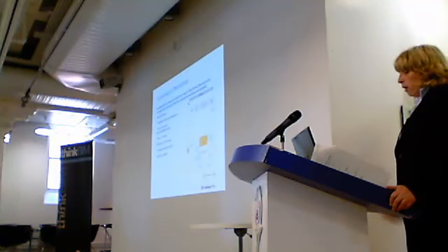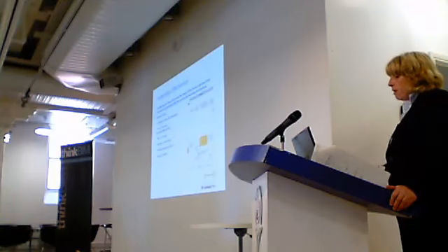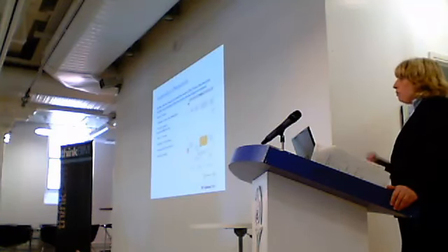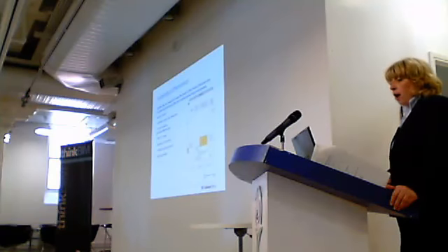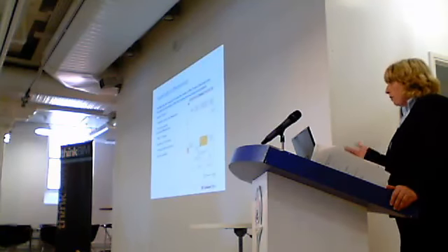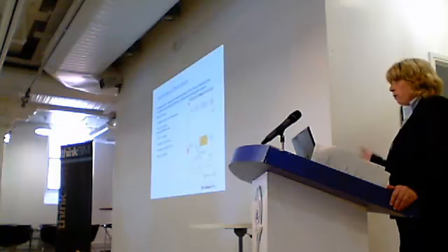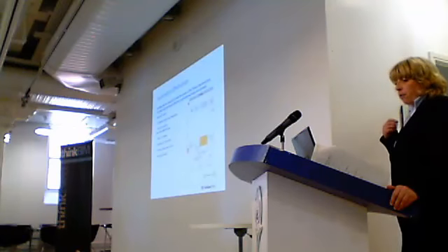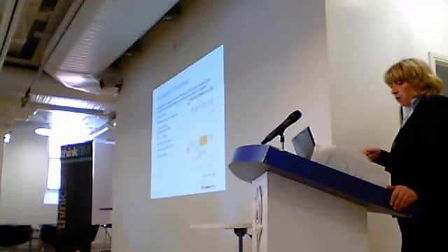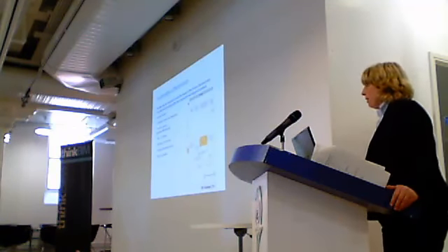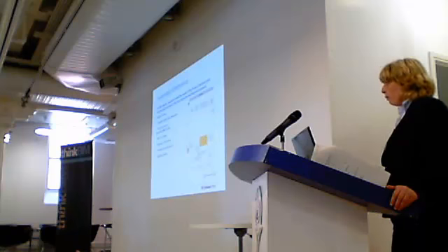And the final one is functionality and effectiveness. This is really about the monitoring post-completion. So establishing the needs and measures early on, and then measuring that post the completion, with both the environmental side and the carbon side, also with how the building is used. So we're looking at the types of studies we can use. The feedback and lessons learned really have to feed back into this, and this is how we improve the whole cycle going forward.